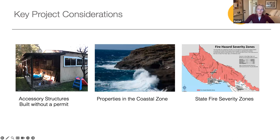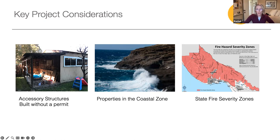There are many things to consider when building an ADU, but we wanted to cover some key considerations that often come up. Starting with accessory structures that you've been dreaming about converting to an ADU: your ability to do so often hinges on whether the building was originally permitted. If your building was not permitted, it will need to be brought up to the current building code, including complying with the four-foot side and rear setback allowed for ADUs. And if the structure sits within the setback, it is often more economical to demolish the building and build a new structure that best suits your needs.